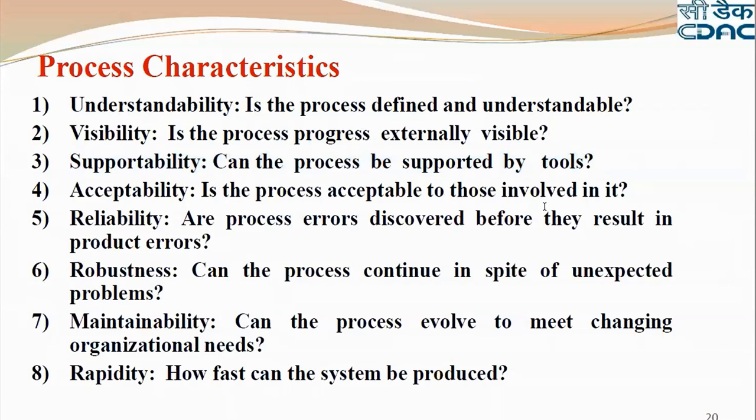Acceptability: is the process acceptable to those involved in it? We are developing, so we should involve the client team, that hospital team, on and off to make sure we are on track, right? They may say, "Oh, okay, this I gave, but it is wrong. It should not be like this. It should be like this." That's perfect, no problem. Because anyway, we have to do as per the clients, the doctors. Why involve them after 4 years or after 6 months at the end of the project? Wherever possible, involve them in the beginning, so the project can be developed with quality, at the same cost, at the right time. Project should involve clients or stakeholders at all the appropriate stages, so that it can be developed with the required quality at the right time, with the proposed cost. Okay.